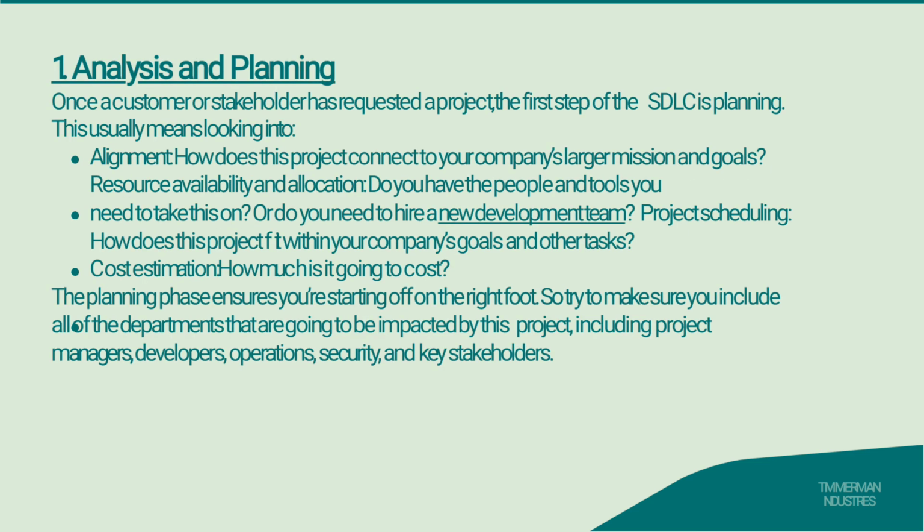First step, which is analysis and planning. Once a customer or stakeholder has requested a project, the first step of the SDLC is planning. This usually means looking into alignment: how does this project connect to your company's larger mission and goals? Resource availability and allocation: do you have the people and tools you need to take this on, or do you need to hire a new development team? Project scheduling: how does this work fit within your company's goals and other tasks? Cost estimation: how much is it going to cost?